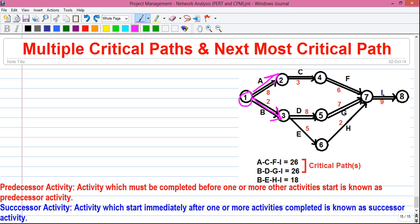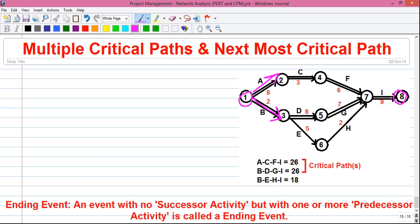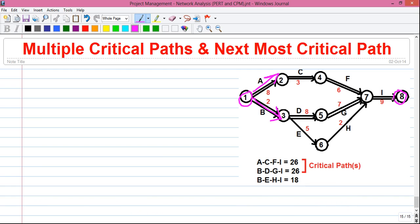Next is the ending event. Our ending event is event 8. So the event with all incoming activities but no outgoing activities is called the ending event. In this case at event 8, only the activity I is ending and there are no activities exiting or emerging from event 8. So that's why it's our ending event.